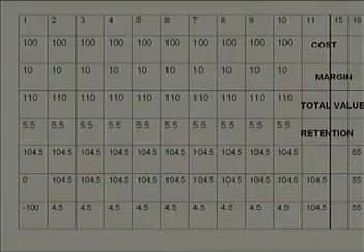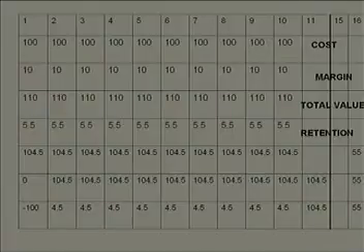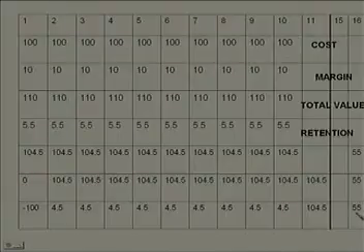That is why it is coming in negative, minus 100 for month 1, for month 2 it is 4.5, which is plus, month 3 again it is plus 4.5, month 4 also it is 4.5, this continues till month 10, and finally you find that in month 11 you are receiving 104.5, but you have not spent even a single rupee. So, everything is coming in your pocket. And finally, at the end of month 16, you are getting the retention money also, that is equal to 55.